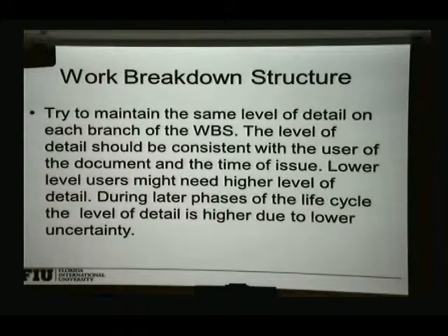So the vendor's going to charge me $200 for that closer if I buy one of them, but he's going to give me a discount of $180 if I buy 500 of them. So if I multiply it times 500, I'm going to get a higher number than I'm actually going to get, and that might make me less competitive, and then I don't get the bid. So how do I factor that in?